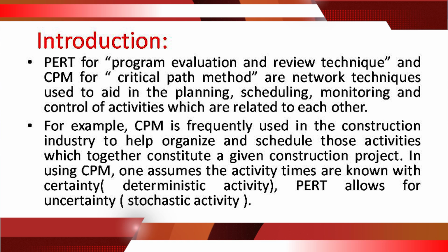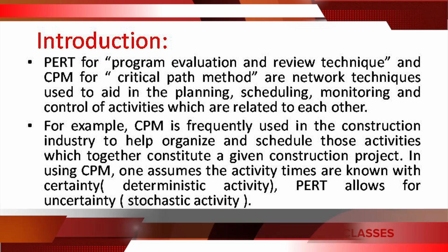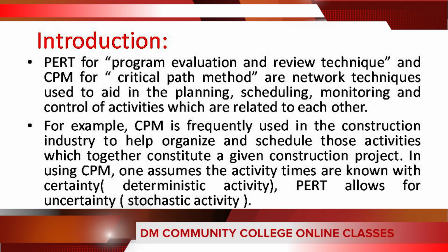In the case of PERT, the activity times are uncertain: stochastic activity. So this is the difference between CPM and PERT. PERT works on stochastic activity, CPM works on deterministic activity.